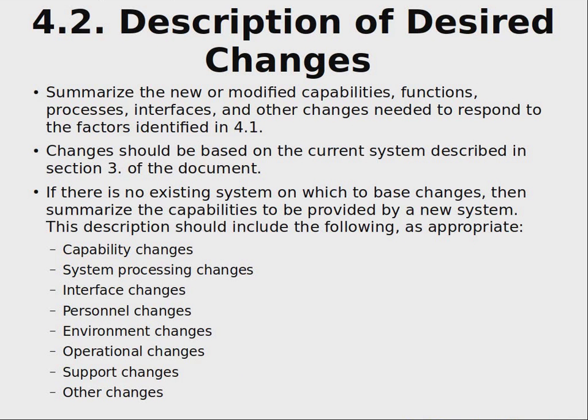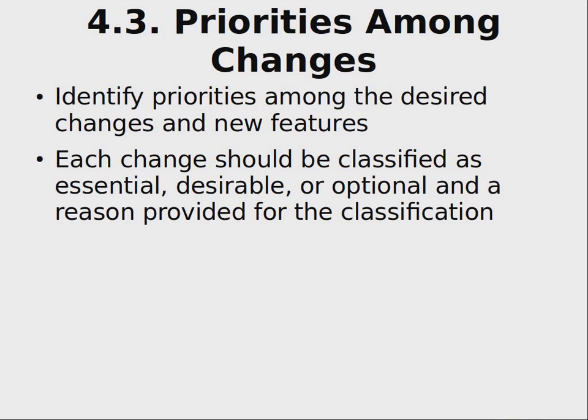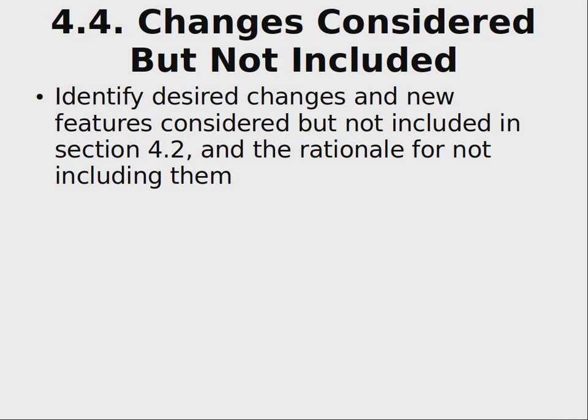And then you describe these changes, how you can change the existing situation for the better. First you write some short summary, and then you go into more detail. For example, what are the priorities? In many complicated systems there may be different subsystems, and you may not be able to afford changing everything. Then you write priorities, how you start changing, and then what changes are just nice to have.